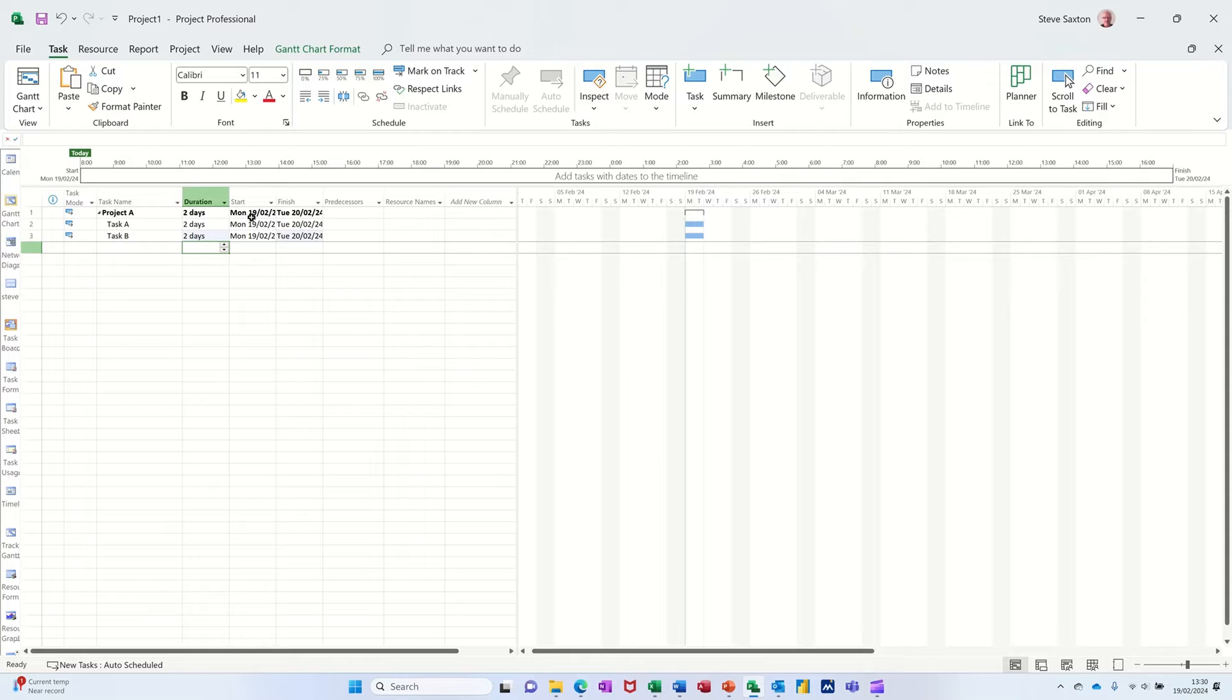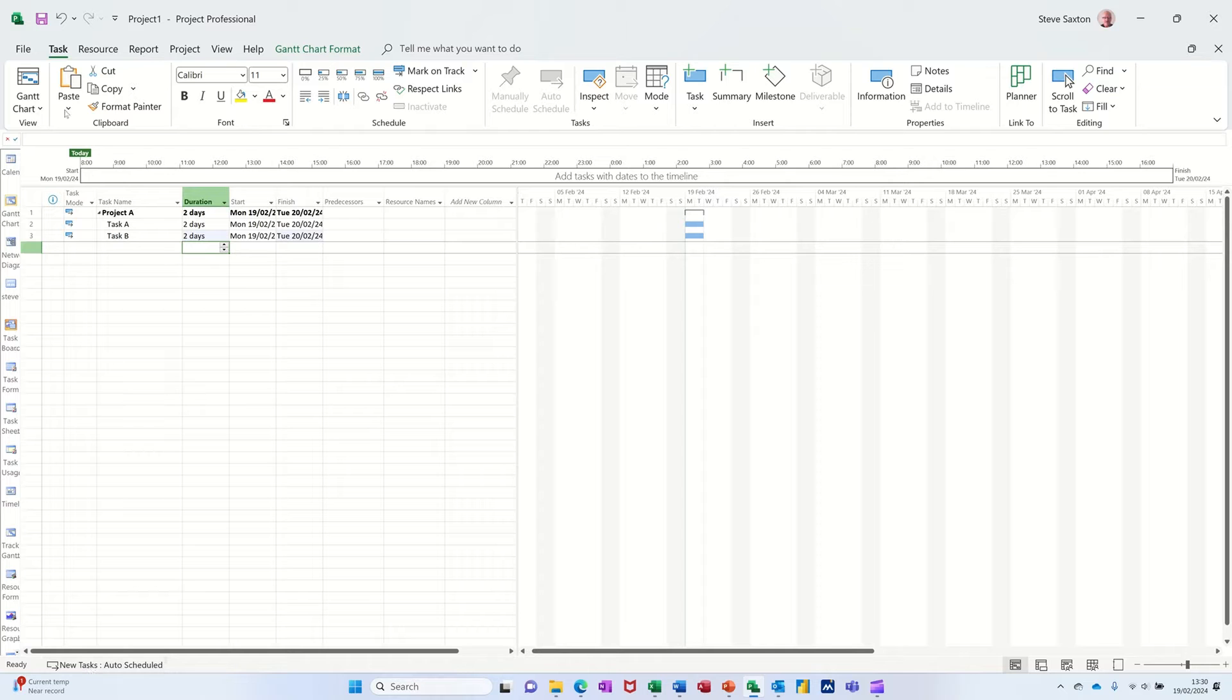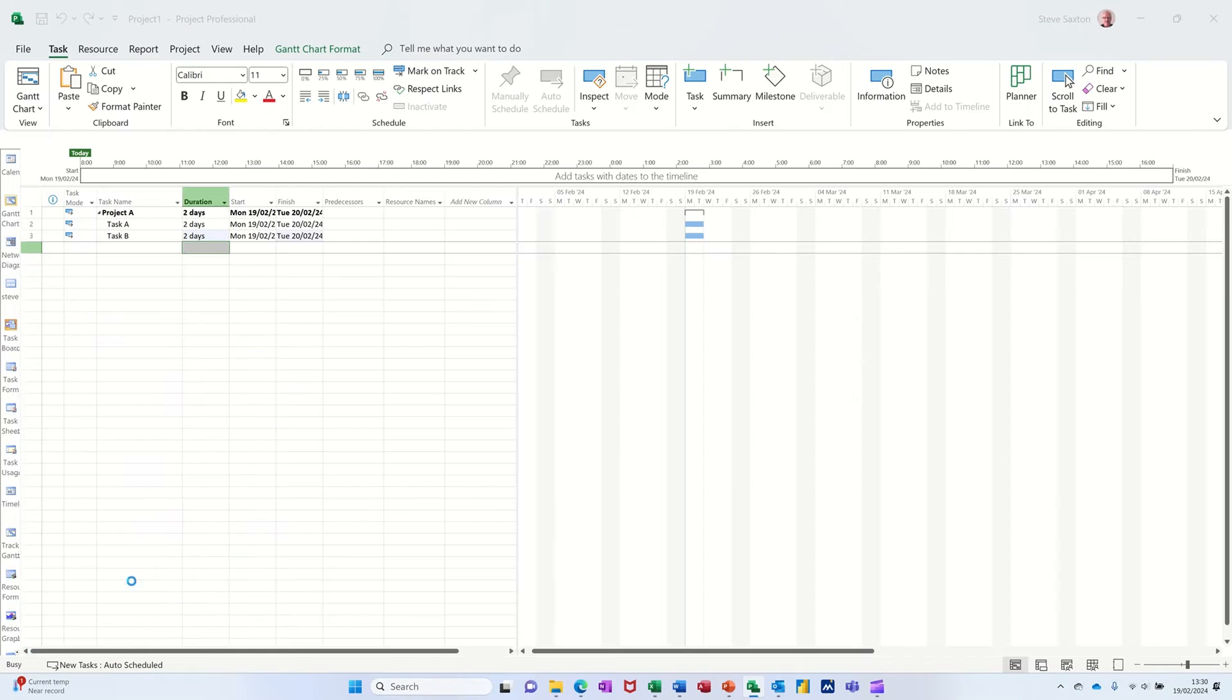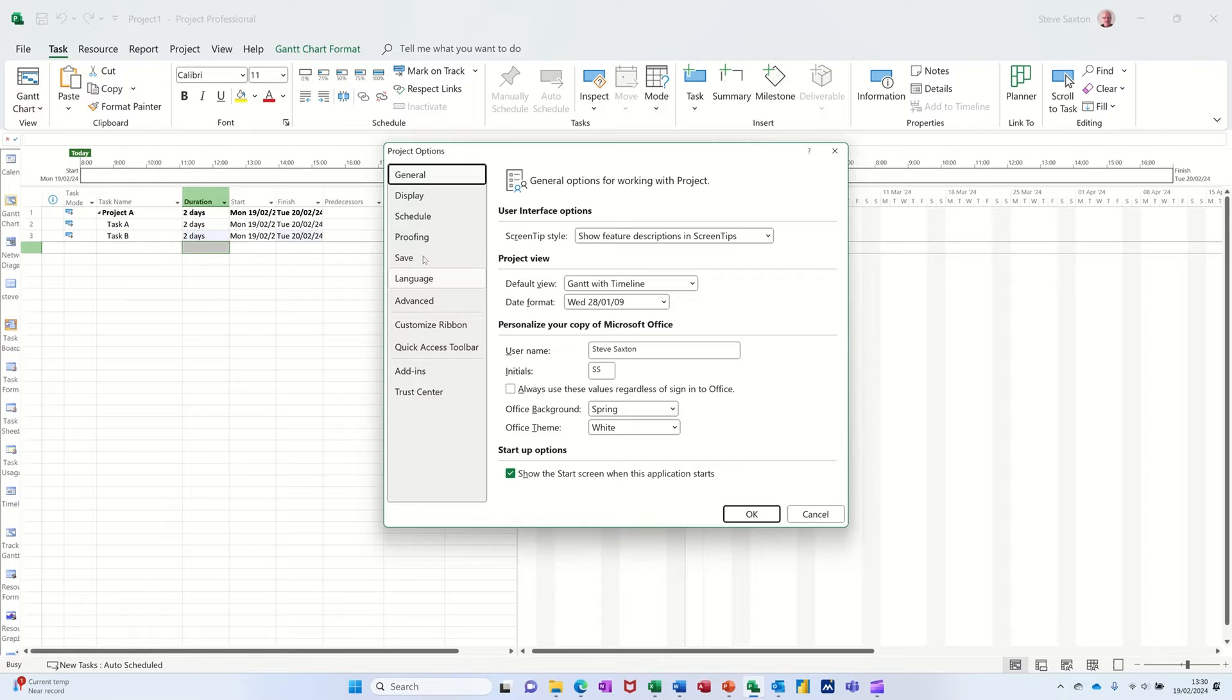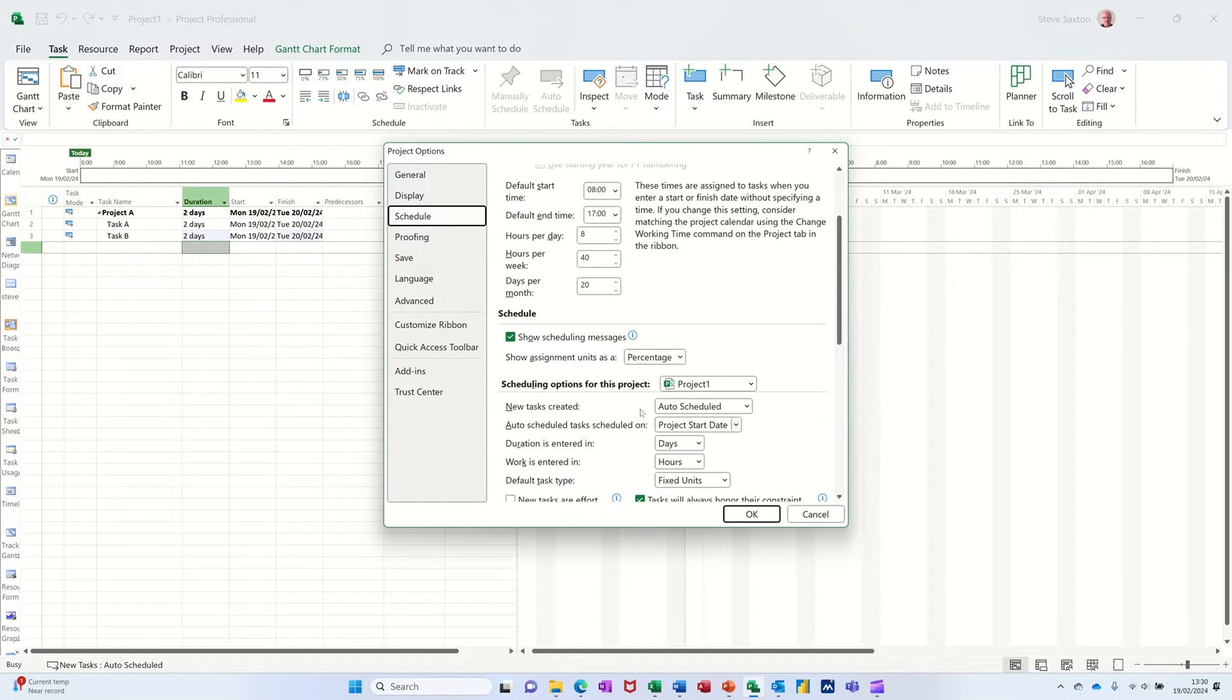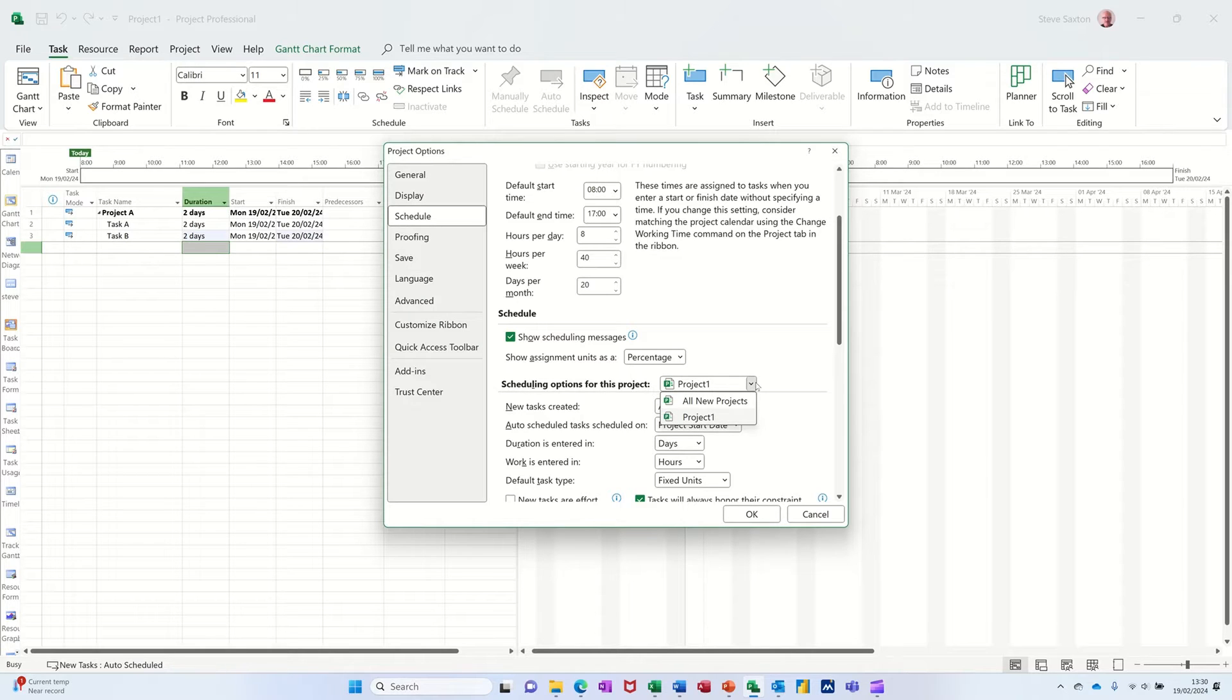Now I've got mine set as auto-scheduled, that's the default down the bottom here. I've changed that in settings - going to File, Options, under Schedule you can make every new project auto-scheduled.